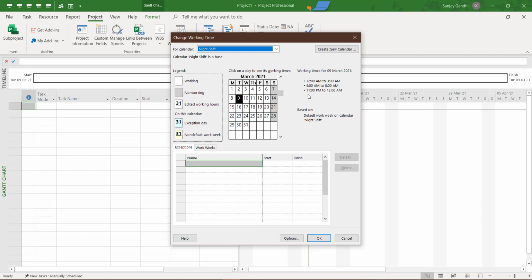Subsequently, on second day, for example, in the evening or late evening, we start our next day available at 11 p.m. for example up to 12 a.m. and subsequently the other days follow. On the last day, for example, my fifth night work day, I'll be finishing my work in the morning at 8 a.m. and thereafter there will be an off day on Saturday evening and Sunday evening, starting the work again on next Monday. That's how the night shift calendar works.